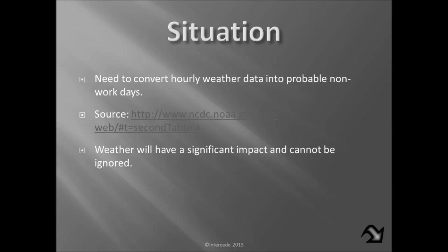Now, what we did in rain delay before was take the average data, and we used the weather base for that, for rainfall in excess of 0.20 of an inch, or 0.2 inches. And we're going to use that same metric, though I'm beginning to believe that we could reduce that to 0.1 inches to determine a rain day, though that is still indeterminate. Several different mechanisms are used.